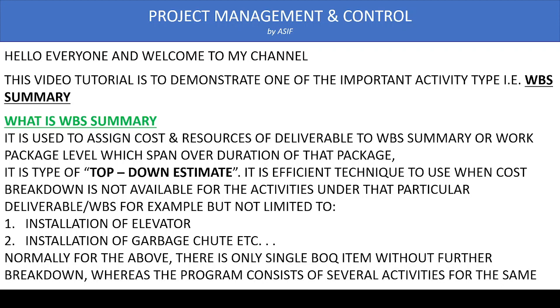So in this case, it's a sort of top-down estimation that we have the final value of the product or deliverable but we don't have that breakdown. So to overcome this issue, Primavera provides us an excellent tool which is WBS Summary. Let's see what we can do with this WBS Summary and how we can assign it.